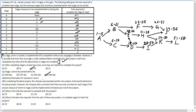For questions 3 and 4, the company was awarded two more projects identical to the above. However, there is only one team per stage, so no stage can be implemented simultaneously across both projects. Effectively, once stage A of project 1 is over, stage A of project 2 can start — but not before that.